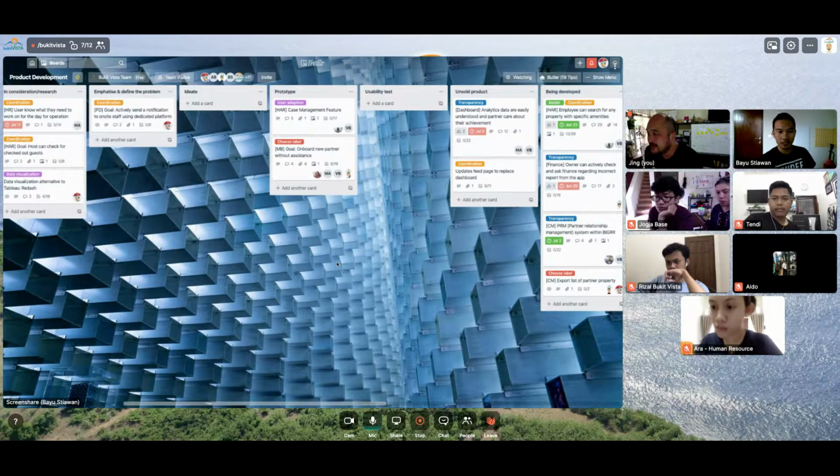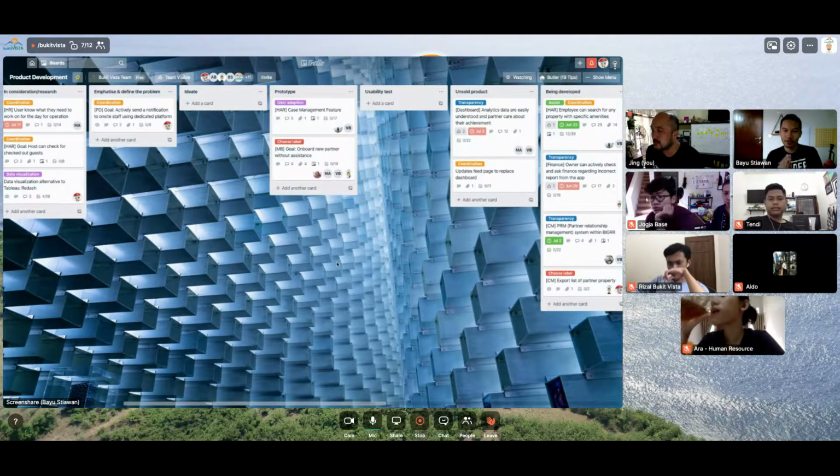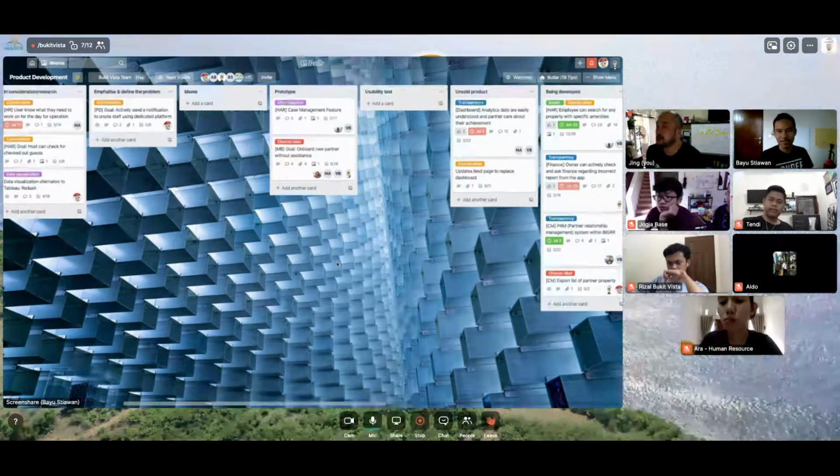No, it's because the doing is already inside the planning. So that's prototype and usability test. That's why we have MVP. MVP is basically we don't have to do a lot of things. We just do a small thing, just prove that this works, and if that's proven, then we add one more step, right? So instead of doing big and then failing, it's fail fast and learn fast, basically.